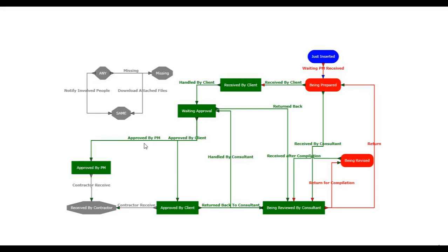The first thing that Prosper does, without you telling it anything, is put a history record saying this person, on this date, from this IP, took this document from this status to this status following this action. This is very nice. But that's the default, and the one that happens for free.